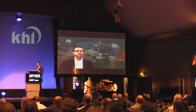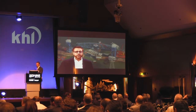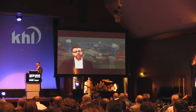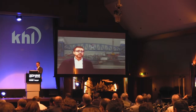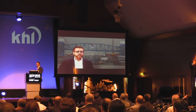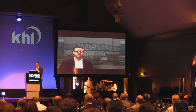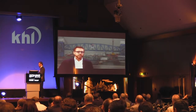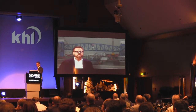Of that 12 hours on setting the new bridge, we only had 7 hours to accomplish all our tasks. And then as we removed the old bridge, we only had 5 hours. So it was critical that we meet our time frames because it was going to cost us money per hour if we exceeded those times. In addition, we had a bonus if we beat those times. Our client's numbers were greater than that, and of course we want to continue to do business with them, so it was of utmost importance to us to make sure that we met those numbers.